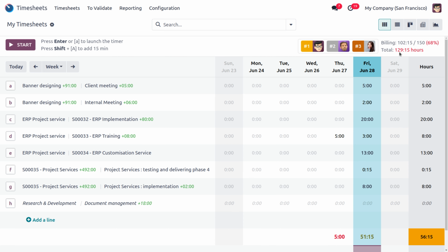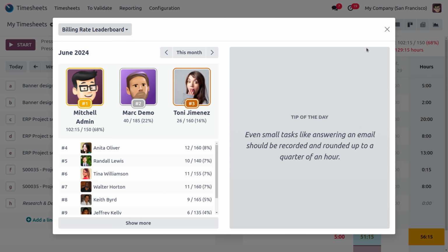Okay. So for this person, that is for Michelle admin, let's check for Michelle admin. For Michelle admin, 150 is the billing rate target, but 102.15 is recorded, which is 60% only, which has not reached the billing target rate of 80%.